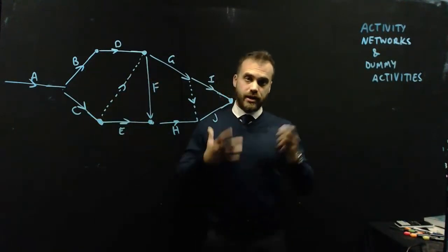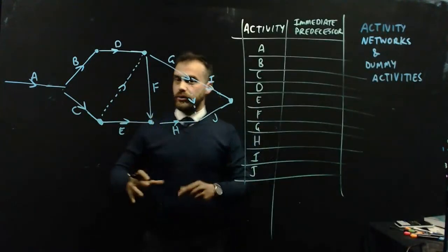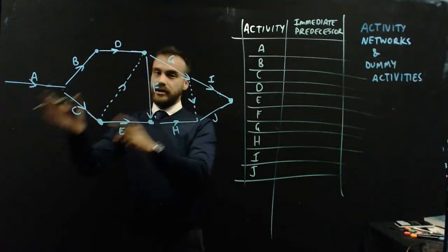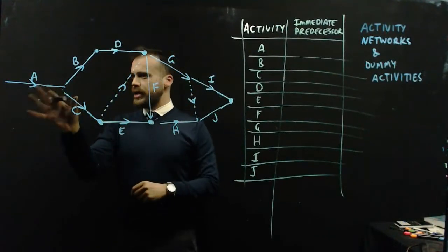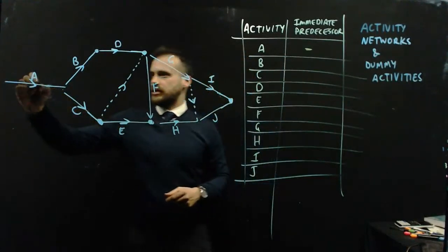So here is a network. And now we're going to create our precedence table. Let's go. We can start from the start, we can start from the end. I don't mind. Let's do a little bit from the start and a little bit from the end. So A is our starting one which means it has no immediate predecessors. Done. I've done A.